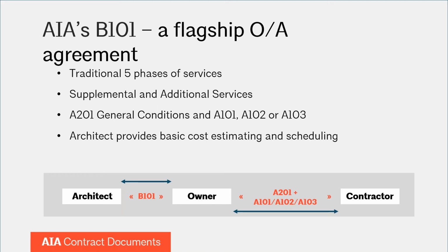You know, these situations really happened to me, and some of them may resonate with you as being similar to your experiences. So about 5 years ago, we had a project, a custom home. We discovered during CDs that the owner's surveyor mistakenly labeled a 14-foot wide utility easement on the side of our site as 5 feet. So we had to come up with 9 feet. We had to redesign a significant part of the project, shaving off 9 feet.